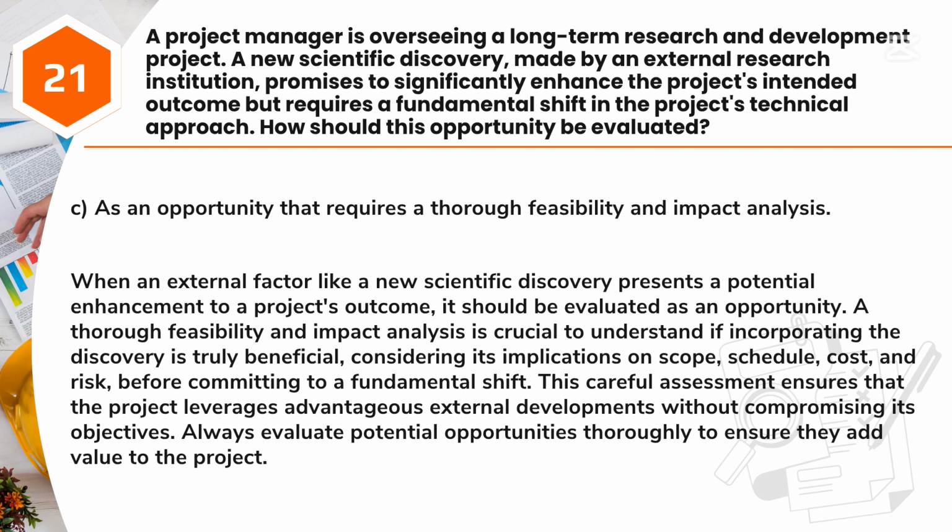Answer: C. As an opportunity that requires a thorough feasibility and impact analysis. When an external factor like a new scientific discovery presents a potential enhancement to a project's outcome, it should be evaluated as an opportunity. A thorough feasibility and impact analysis is crucial to understand if incorporating the discovery is truly beneficial, considering its implications on scope, schedule, cost, and risk, before committing to a fundamental shift.